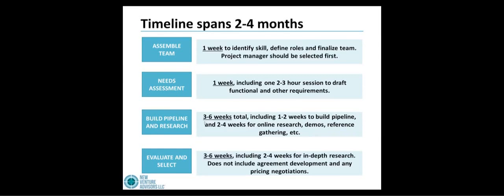The needs assessment, the process of developing the process flow and establishing requirements and things like that, I don't really see as a month-long session. When you actually select a vendor, you may go through a much more detailed requirements development process. But at the needs assessment phase, we're looking to really get at a high level: what are your processes, and what are the general needs that you have?